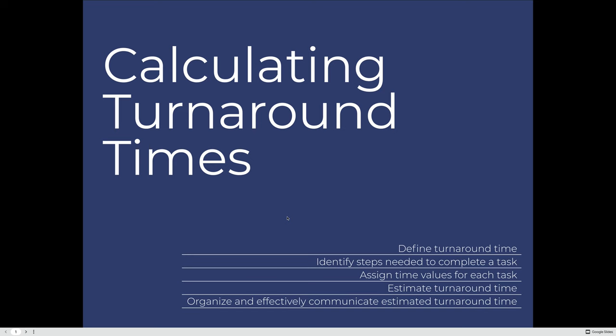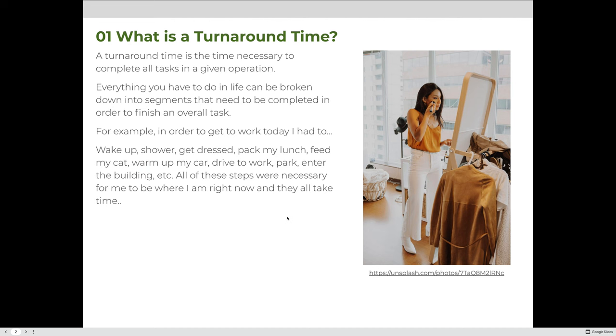We'll then use that to figure out what is the absolute last day that we can start a project to meet a deadline for a client, and then we'll effectively communicate that to our clients. A turnaround time is the time necessary to complete all tasks in a given operation. Everything you have to do in life can be broken down into segments that need to be completed in order to finish an overall task.